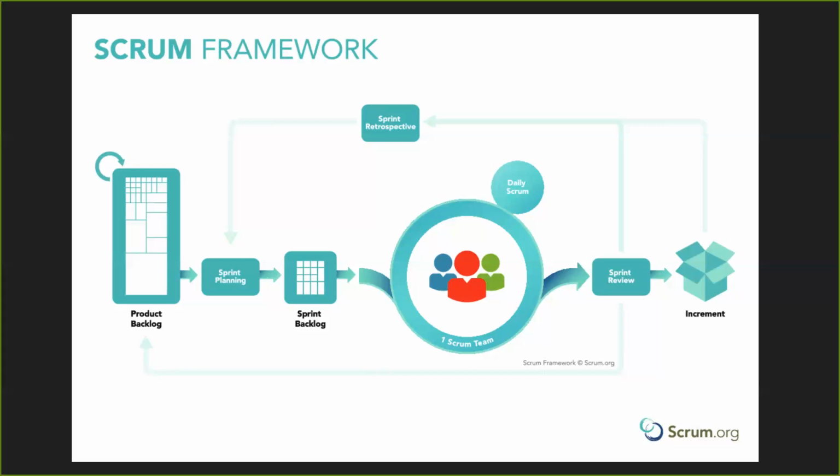And also by looking at that trajectory, let's say 2 months before January, you can see that your trajectory has changed, and you then can go back to the client and say, this isn't quite working out. Can we remove something? Can we change it? Can we move it back? Most likely, it's usually, okay, is there something that we can remove in order to get to that goal? Because in a big project, there might be a lot of little things that aren't nearly as important.